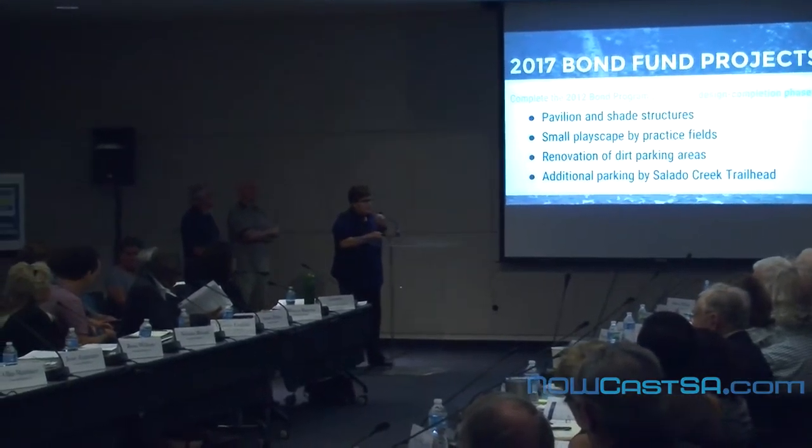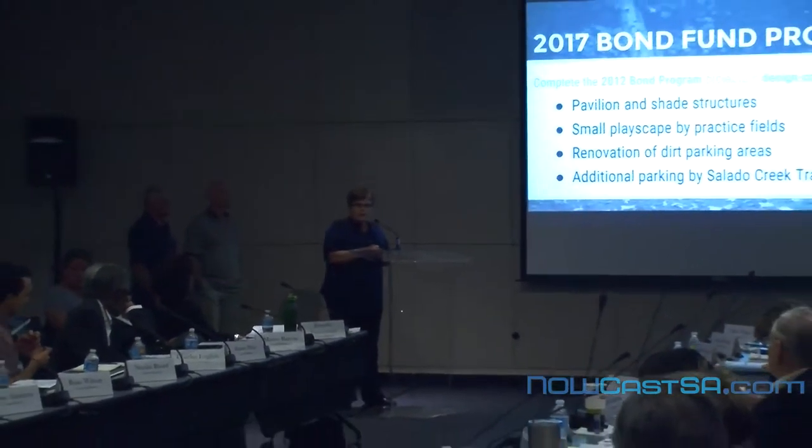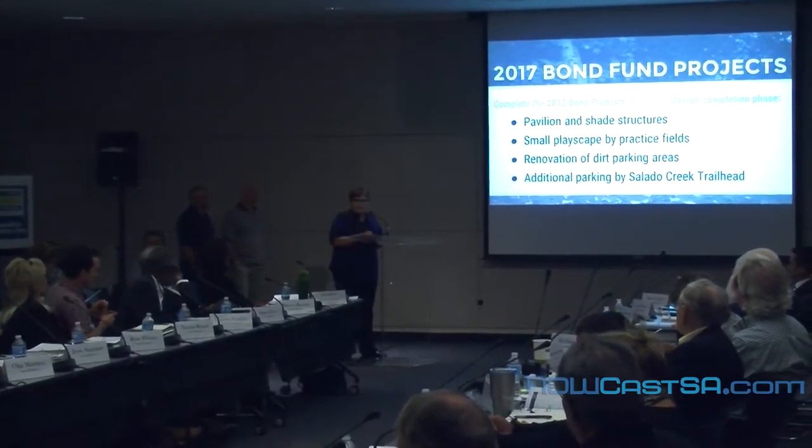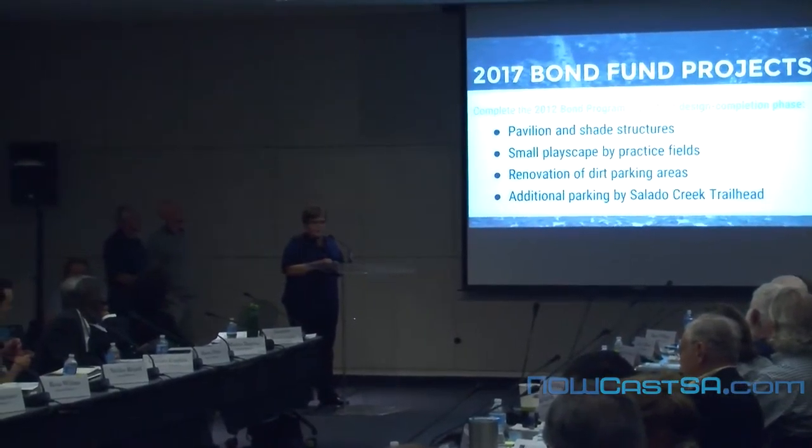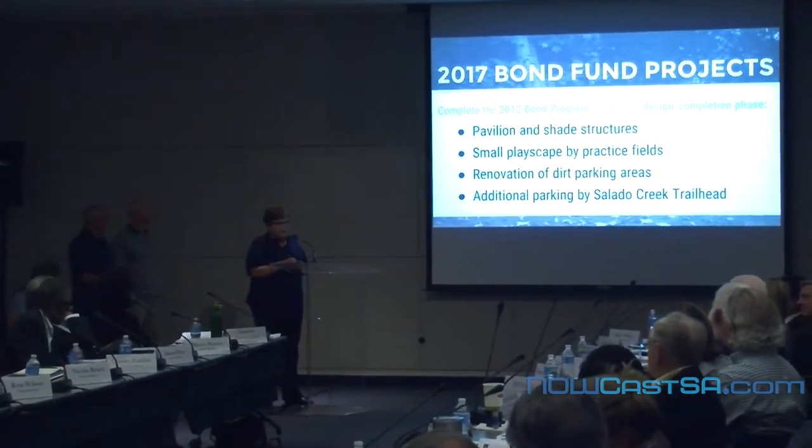We want to complete the projects from the 2012 bond fund. I want to point out that the last large amount of improvements that McAllister Park had was in 2003, where we received $1.6 million. 2007, we only had $100,000. This last time, 2012, we had $1 million, and we only received a parking lot that has only 28 spaces and does have some solar lights, and then also renovation of a paved path. Those two projects were very much over budget, and that's why we're very short on what we have.